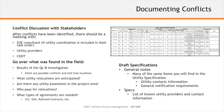The use of the utility conflict matrix and this process will help finalize the utility specifications at the FOR level and then prepare those for PS&E.